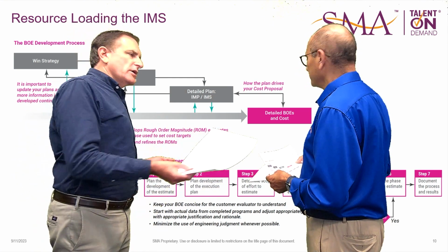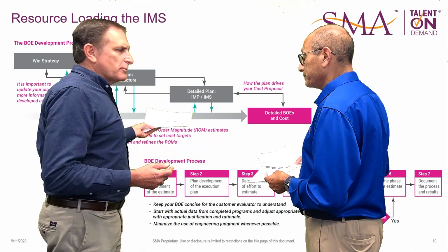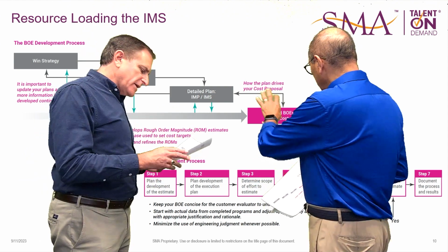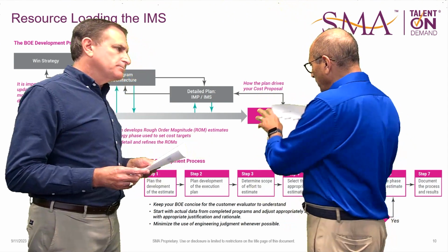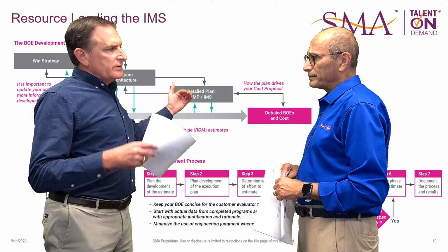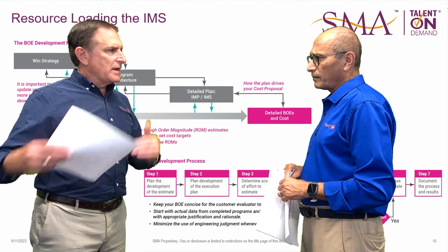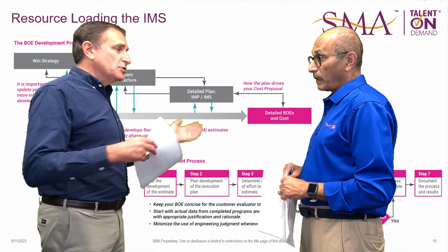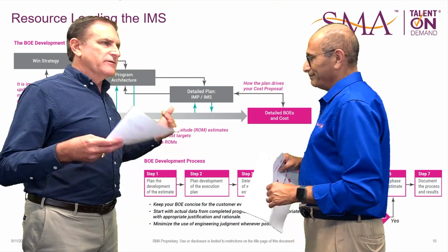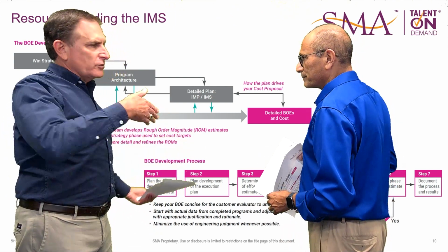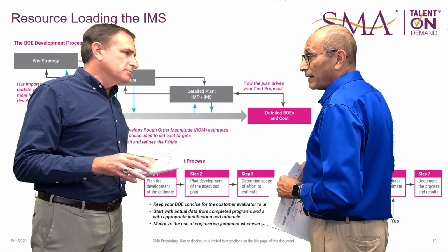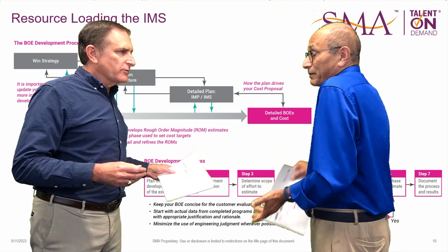And you were talking last week about realism, right? Really important. This really is important to helping you develop that realism in your plan. And I see in this illustration we also have the BOE writing process as integral to this, right? Absolutely. Because the idea is if you get the resource loaded IMS and you can hand that plan to the folks that are actually writing the BOEs, you use that to feed the BOEs. Then you can make adjustments based on price, based on funding, based on a variety of things. And it's a decision loop that occurs that helps you get to a quality schedule. And you have to have one in order to write a BOE. That's right. Or else you write the BOE about...